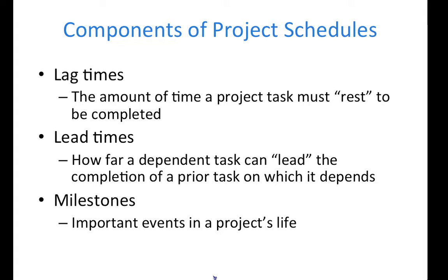In normal use, lead time usually means how much advance notification one needs to give someone. In project management, it refers to how much a succeeding task can lead the completion of a preceding task. The book, for example, talks about how wiring in Dr. Howard's lab construction can lead the construction of the walls themselves. As the walls are put up a room at a time, wiring can be strung through those walls. Therefore, the wiring can lead the total completion of the walls.